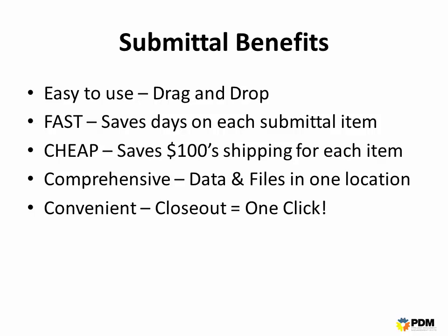The final thing, and probably one of the most important things from the owner's standpoint, is that the PDM submittal processing allows for a very efficient and a very complete closeout. All the documents are stored electronically, so at the end of the project, the construction manager can simply select the project, select the documents you want to close out, press a button, and transfer all of the files that have been collected during the entire project onto a CD, a hard drive, or transfer them electronically to the owner's facilities management system.